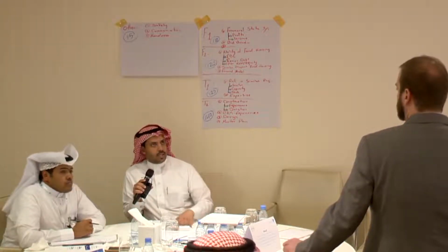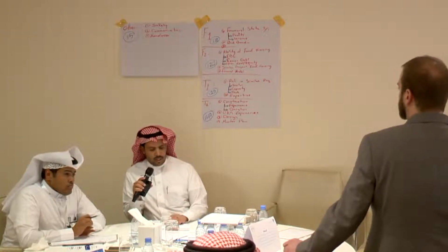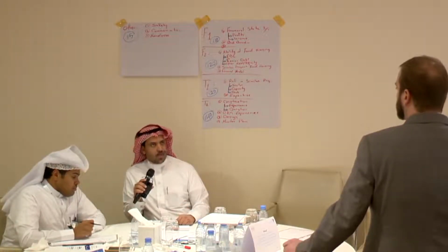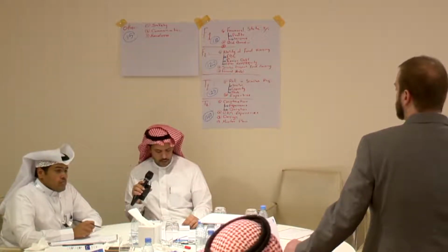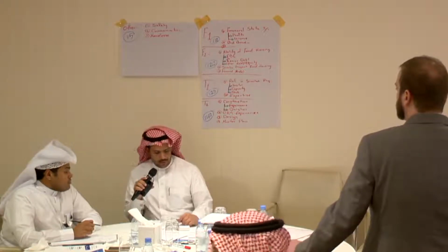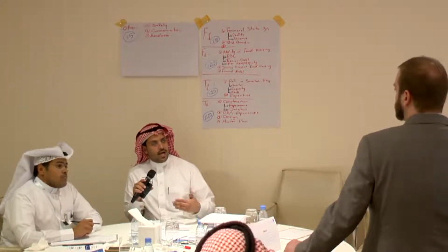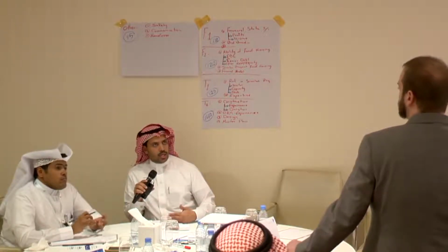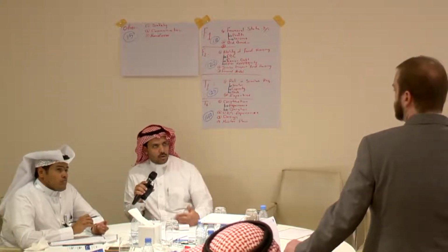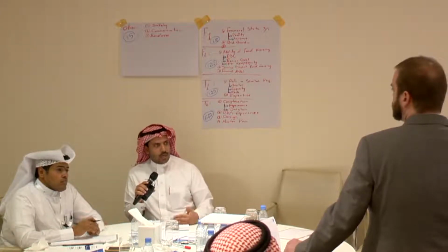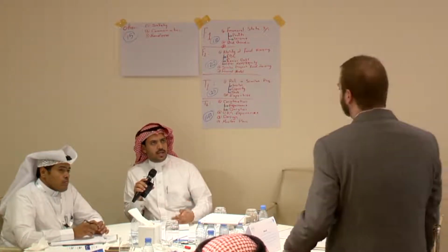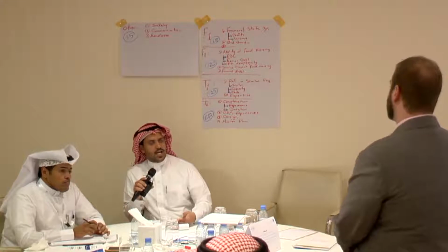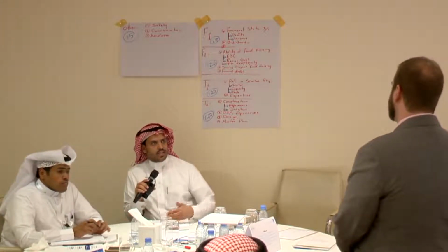You have to pay on it all the way, the 30 kilometers, to a platform in each way. Then we have the report. We ask to have it on a monthly basis during the construction. Then it will be quarterly. We put in one of the elements that during the 27 years the project covers the cost of the construction and the operation, then we will transfer it totally free to every single user.